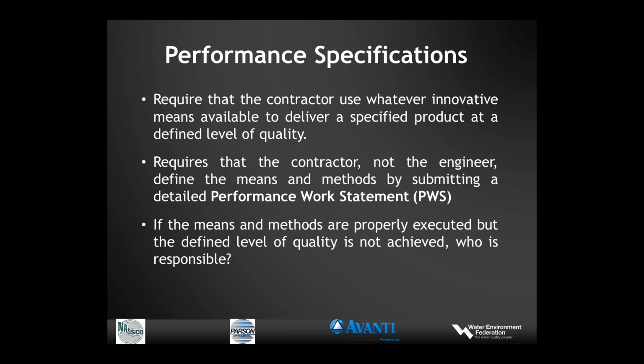Performance specifications are on the other end of the spectrum. These require that the contractor use experience and innovative means to deliver the product, a specified product, at a defined level of quality as specified by the engineer.